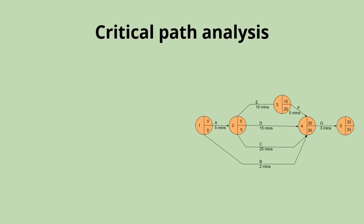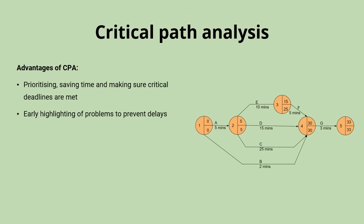As well as being able to draw network diagrams, it's good to evaluate the usefulness of critical path analysis. The whole point of these diagrams is to prioritize activities on the critical path, helping ensure complex projects remain on schedule. If an activity has a significant float time — like activity B in our diagram — it doesn't really matter if it goes off schedule. But for activities on the critical path, we need to divert resources towards them and make sure they don't fall behind.